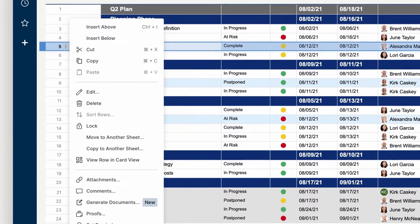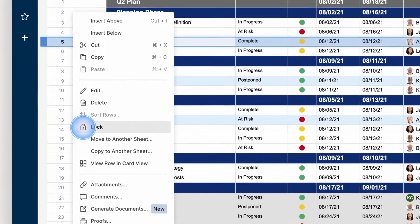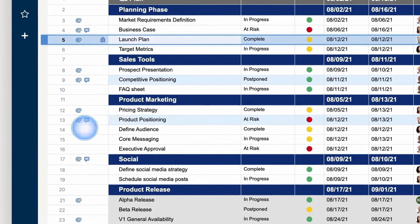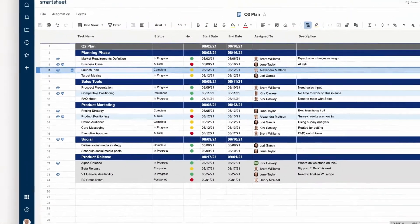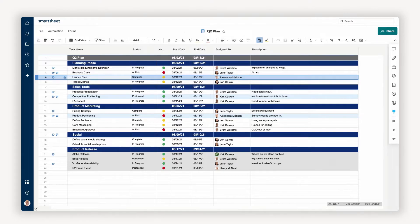When I've got information that needs to stay as is, I'll lock the row so only admins can make changes to it. Now let's organize this sheet a little more by adding hierarchy.